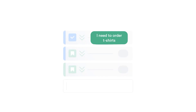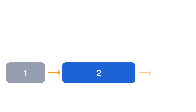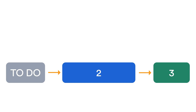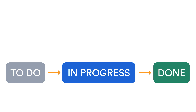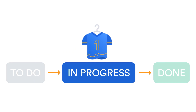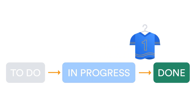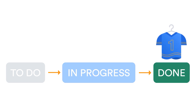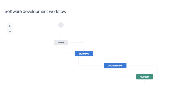To get project issues done, you need a work process. This is the sequence of steps done in order to reach a particular end. Your process could be as simple as to do, in progress, and done. Take, for example, our t-shirt order. First, this issue needs to be started. Then it's being worked on, so it's in progress. And finally, when the order is complete, the issue in JIRA is done. In JIRA, this work process is called a workflow. Every project has at least one workflow that the project issues must follow to complete.